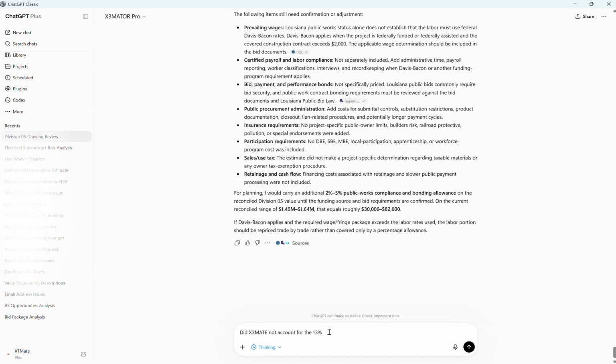Cold form category prices the exterior 16 gauge walls, the interior partitions, parapet framing, the reinforced jambs, headers, and seals, the backing and bridging, all the way down to the anchors and fasteners.